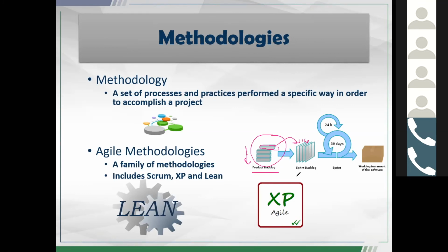Now, every sprint typically runs anywhere from, a really smooth organization will run it as short as 1 week, all the way up to maybe 8 weeks or so. In this picture, it says 30 days, which is fine, but every 1 to 8 weeks approximately, on the extreme side, we would be delivering some minimum shippable product. So some working increment. The idea behind Scrum is that every month or every couple of months, we're getting a working increment, working valuable software in the hands of the end users, potentially.